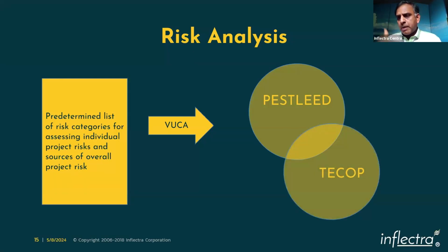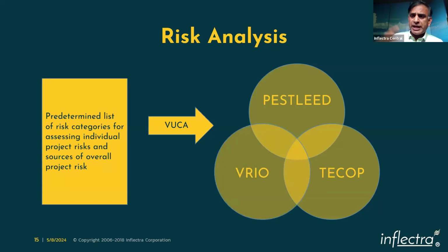The next one is maybe for mid scale initiatives. So you can start looking at TCOP, which is another framework standing for technical, environmental, commercial, operational, and political. And the next one is VRIO, for most internal projects and internal initiatives. We look at: are we adding value? Is that a rare product, or rare functionality, that we are introducing at this particular point? Is that function something that can be imitated by another competitor, and how are we organized to deliver this?